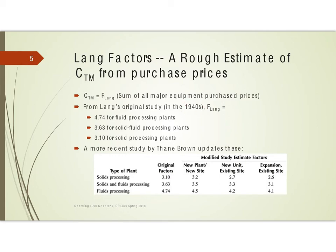This was a study from the 1940s. A more recent variation that I personally prefer is one by Thane Brown, and it has the same basic categories — solids, solids plus fluids, or fluids. If it's a new plant with a whole new site, this would be the same as our grassroots cost. If it's a new unit at an existing site, this is closer to being the total module. An expansion at an existing site also really, for our book's definitions, falls between total module and bare module — so if you're looking for a bare module, this would be the closest.